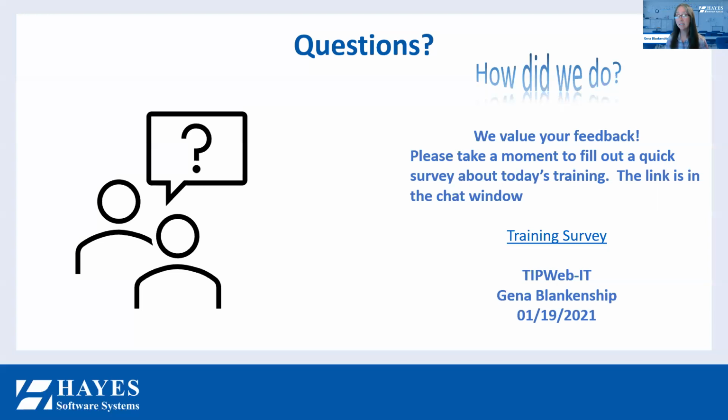So if that's the case, then part of your plan will be deciding what kind of permissions you want to give those people who are going to help you with the audit. So auditors do have to have some specific permissions, and Darla is asking, what permissions do you give them? So auditors basically need to be able to create rooms, do room-to-room transfers, and collect items that have been issued out to staff or students.